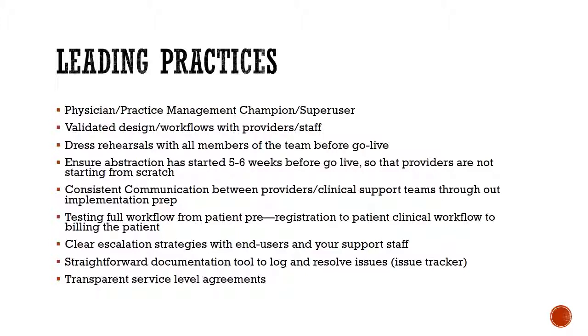It's no use if you identify an issue and you don't document it or you don't escalate it, and you just repeat that issue, or you find that issue 3 days down the line and it hasn't been resolved. It's best to document, report, and follow through, maybe with a weekly status check, a bi-weekly, whatever the case might be, whatever the procedure. Make sure you have a strategy in place to deal with issues or problems that you're having with the system. Might be workflow oriented, might be technical oriented, but make sure there is something in place to tackle these.